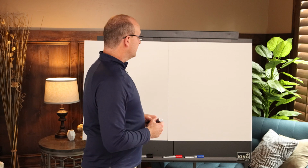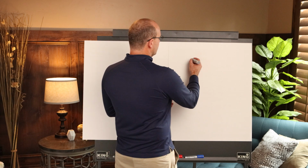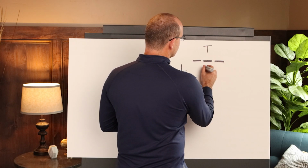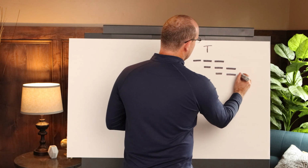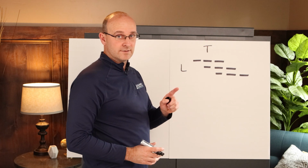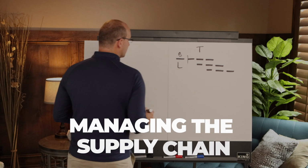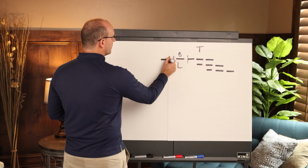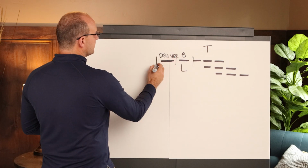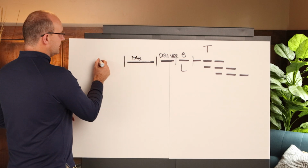When projects start to get behind, it's typically because of a couple of these reasons. Let me explain these one by one. If you have your time by location schedule format with your first, second, and third trade, like we always talk about in these videos, and you have your nice parallelogram, the key things you cannot fail to do are, number 1, managing the supply chain. We've talked about how you must have a buffer before this wagon starts. You must have your actual delivery, and this makes sure that you can get your materials on time. You've got to have your fabrication, which is your make portion, and then the design.